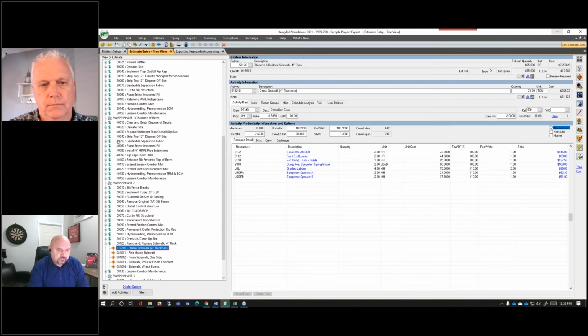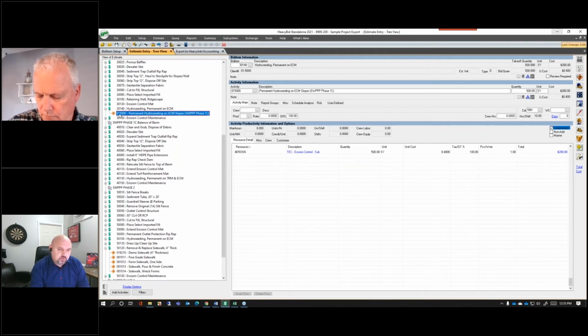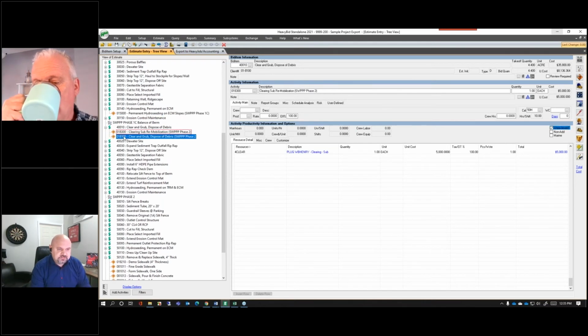The most common 3 are, first, we just use a code when we build our activities that already is going to match how we want to see it in Spectrum. That is probably the most detailed way.